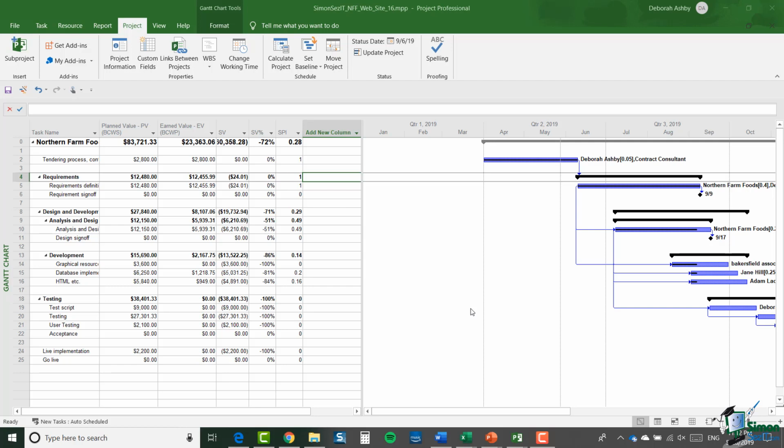The second important point, which is closely related to that one, is that you should have pretty much all of your tasks, resources and assignments in place before you save the baseline, which you're going to use for earned value analysis. There is little point in, say, putting in half a dozen tasks, saving the baseline and then putting in another 20 tasks and expecting earned value analysis to tell you anything useful.